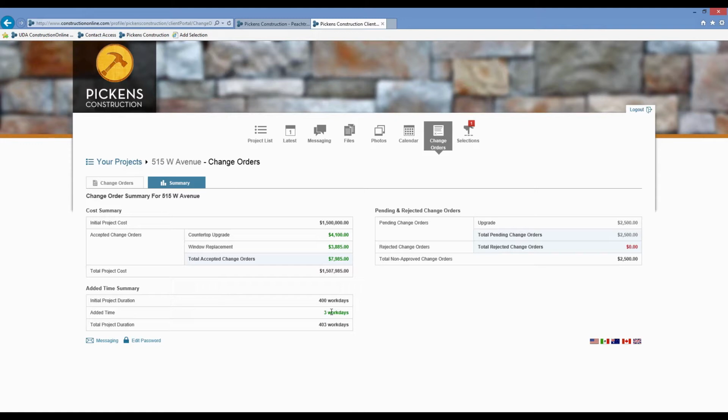Yeah, and change orders, for any of you doing them, I'm sure is really where you can make or break your company. I know I've talked to clients that say that's where they make all their money on the jobs. I've talked to clients that say that's where they lose all their money on the jobs. And the last thing you want to do is have a change order that's not documented or doesn't get to the client in time to be approved, and you have to go through with it or have to leave it out and it costs extra money. And then you end up upside down on the job at the end of it, and it takes you into the next job already upside down, I guess. So yeah, good point.